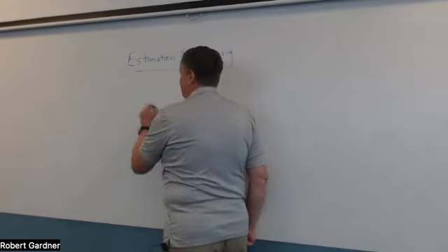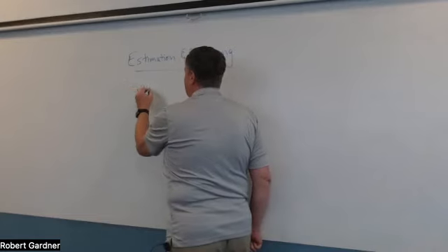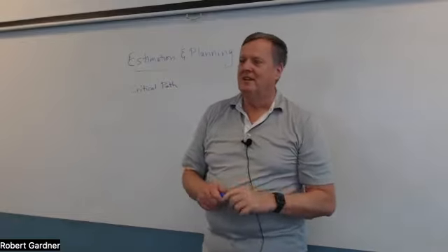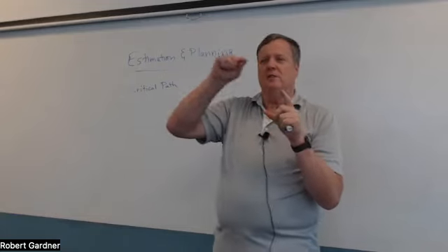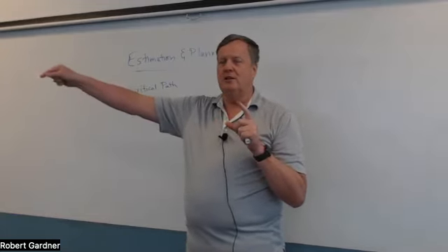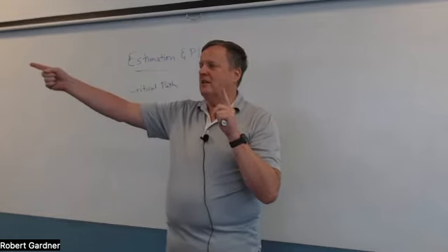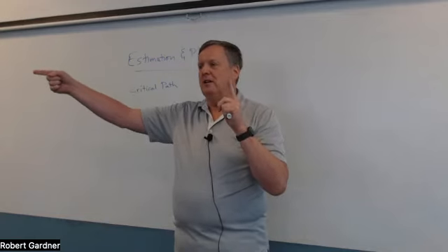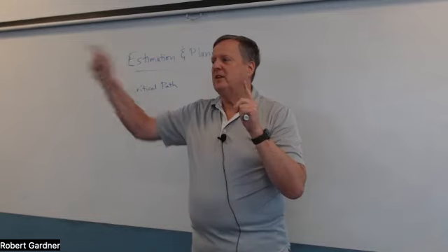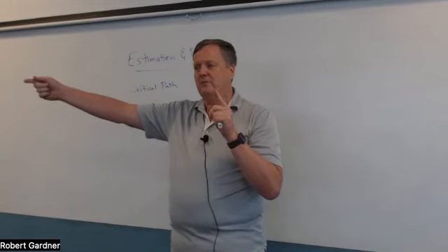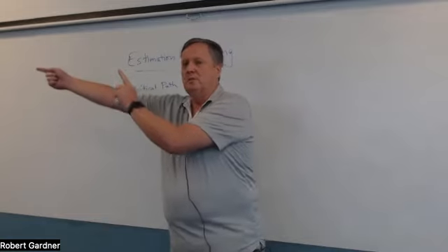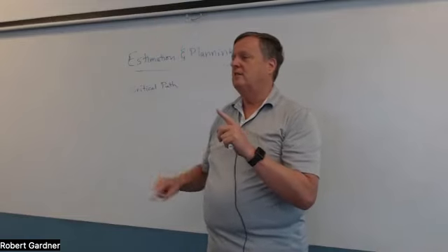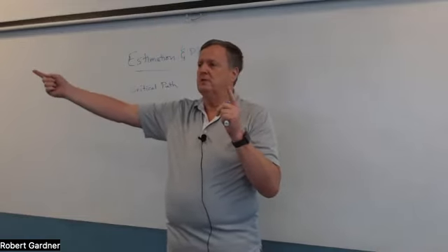First of all, you take what we call the critical path. You know what the critical path is? You've not heard of the critical path? The critical path is called that because there's a sequence of things that have to get done before the product can ship, and this sequence is longer than any other path. So it determines the minimum amount of time it's going to take to finish. You want to make sure everything on that critical path gets done first, because if it doesn't, you're going to push your ship date back. There are all these paths, and the critical one is basically the longest one. So you get that done.